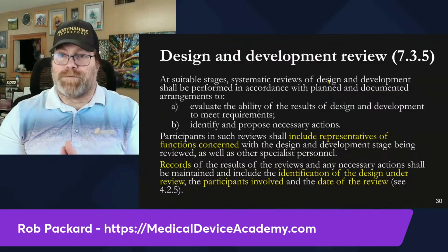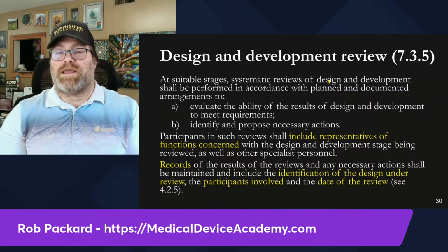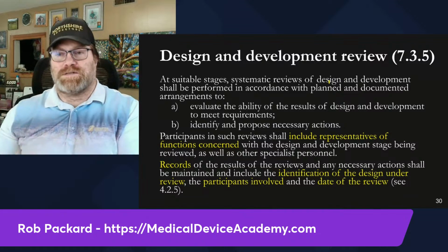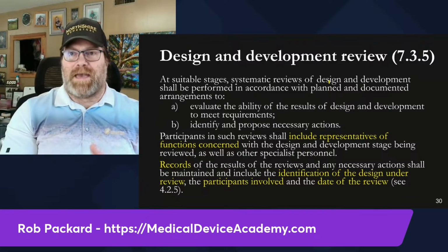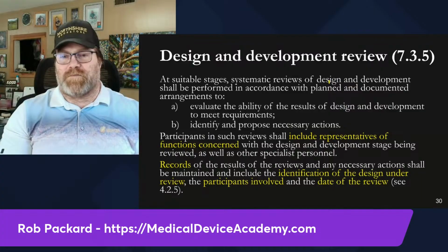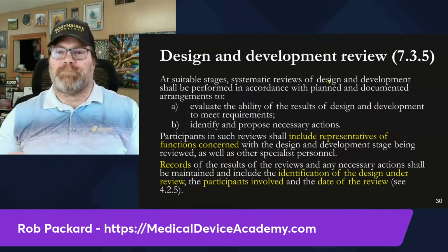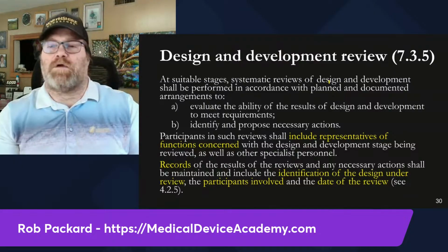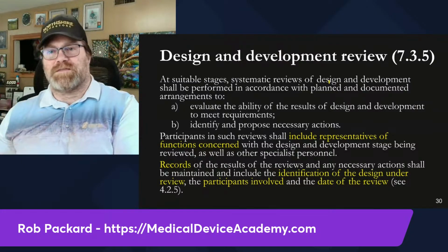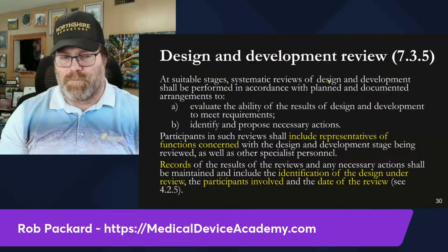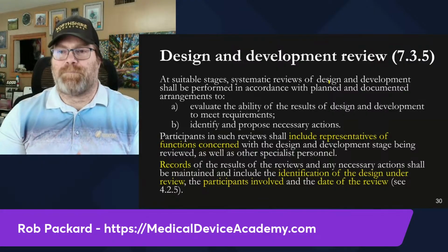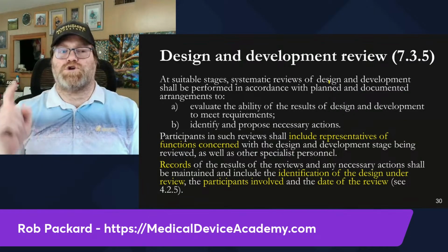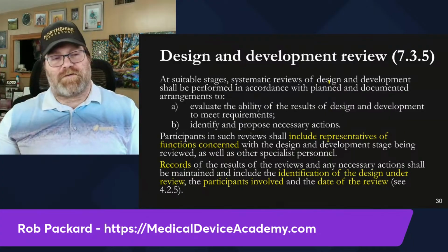In the bigger companies like GE Healthcare, where he came from, you don't even get the money to go to the next phase if you haven't passed all the requirements for all the deliverables. And they decide how to manage their money by deciding, oh, this one has passed that gate, we'll give it more money. This one has not passed that gate, we're not going to give it more money. So that's something that happens in the bigger companies. But technically, you're only required to do one design review at the very, very end.